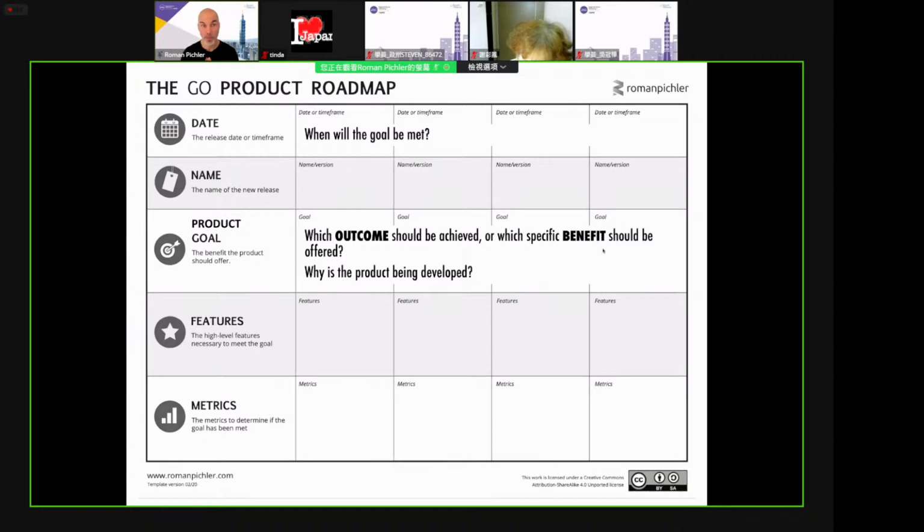But when you work with an external, publicly visible product roadmap, then I'd be very careful when it comes to dates and timeframes. I wouldn't state any specific dates personally. And if I use any timeframes, I'd use just very big, coarse-grained timeframes.